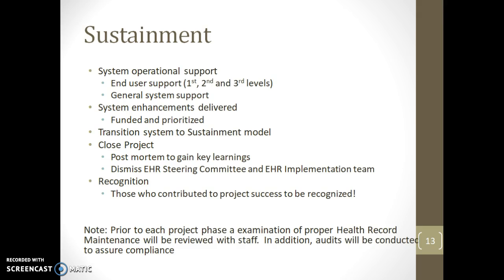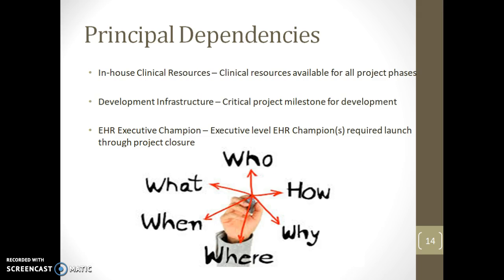In-house clinical resources need to be available to assist during all phases of the project. No one externally has the required knowledge to fill their roles. The development phase cannot begin until the development environment is set up and running and all software required is functioning properly. This is a very critical milestone in the delivery of the project as no development can begin without an environment.